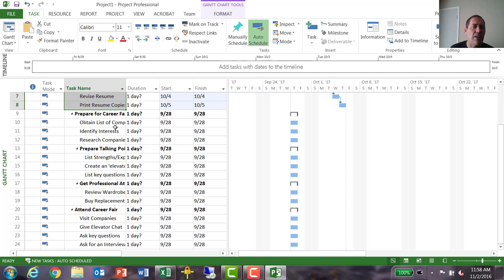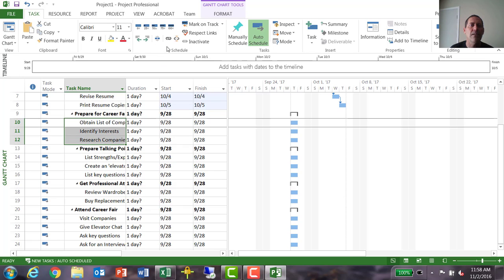Let's do some more down here. Obtaining a list of companies and then identifying which ones you're interested in and then researching those. Again, those 3 things need to happen in sequence. So I'm going to link them all.